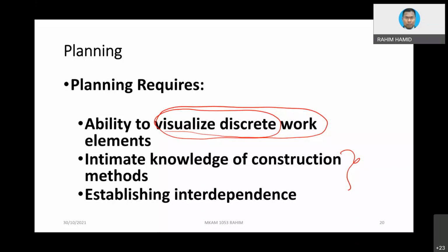So planning is very much related to this concept, except that in planning you put those things in a graphic form, whereas in a construction method you might come up with a description, with some figures or pictures to show people step by step, so that at the end of the day people understand. And from your construction method you derive all kinds of manpower, machinery, and the materials that you plan to utilize.